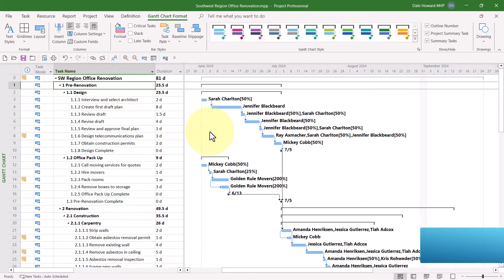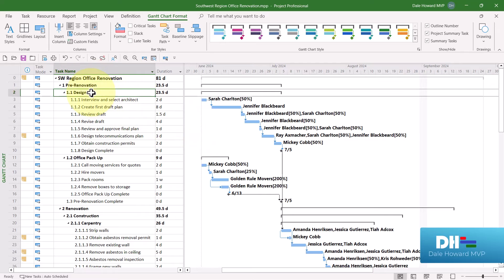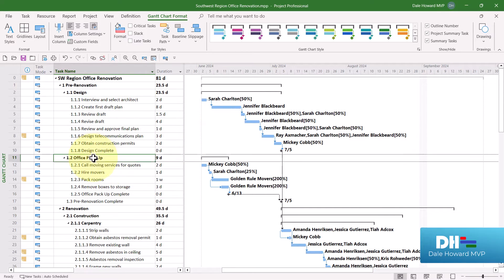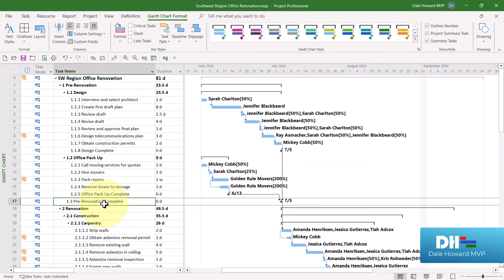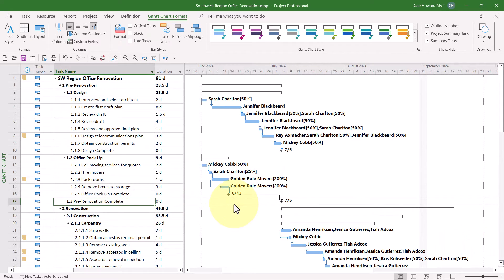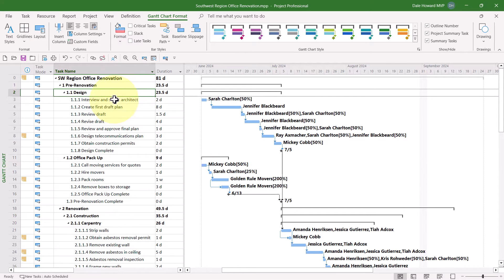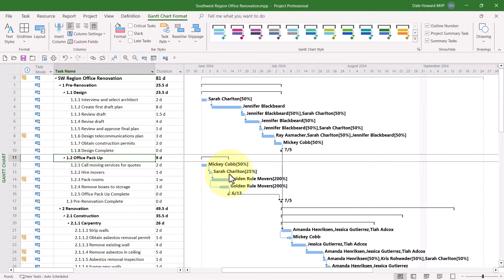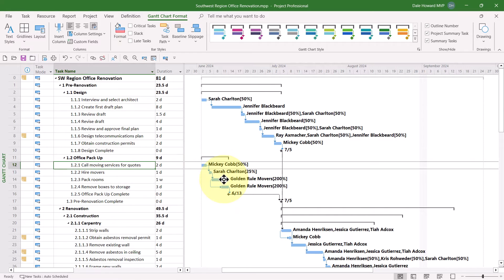Pre-renovation is number 1. Design is 1.1. Office Pack-up is 1.2. Pre-renovation Complete is 1.3. In the Design section, the first task is 1.1.1. In the Office Pack-up section, the first task is 1.2.1, and so forth.